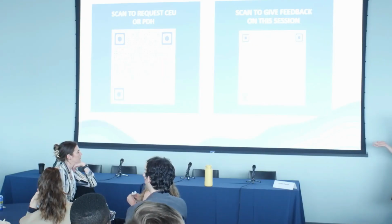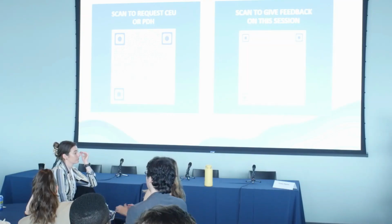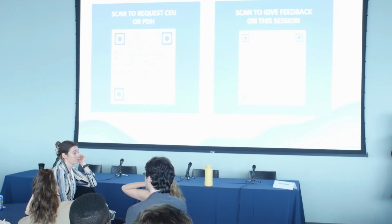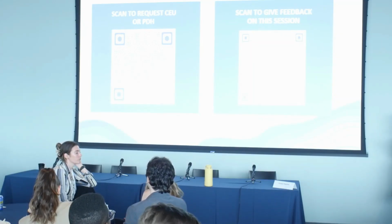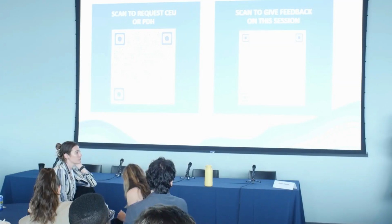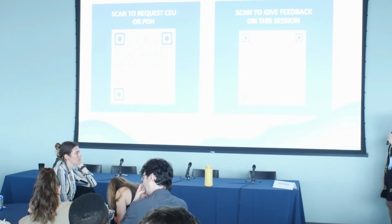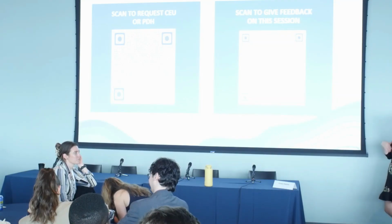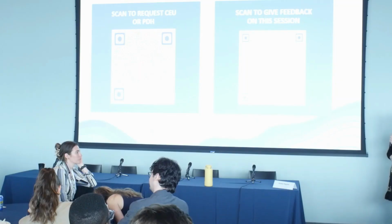The project, of course, got more expensive. We had to deal with COVID. We had to deal with inflation, a double whammy in that particular respect. But I think we've been able to make those adjustments. As you work through a project, there are things that are going to come up that are costs you couldn't anticipate. I think we've tried to work in contingency and put allowances in the contract, and again, you know what you know until you don't know it. Somebody used to call it the known knowns. You have the known knowns, and then you have the unknowns. The unknowns are harder to plan for, but we're trying our best to do that.